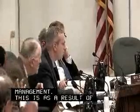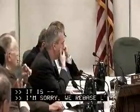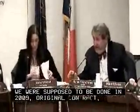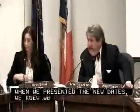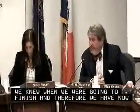I'm sorry. We re-baselined it. Remember, we were supposed to be done in 2009. An original contract, and that contract was signed for that specific time span. And when we presented the new dates, we knew when we were going to finish, and therefore we have now rebaselined the contract to go for the full duration of construction.